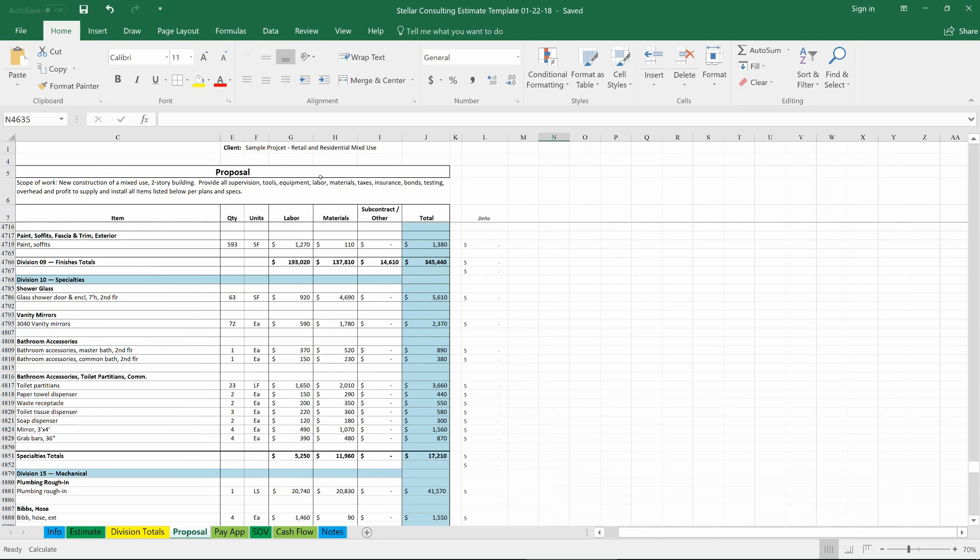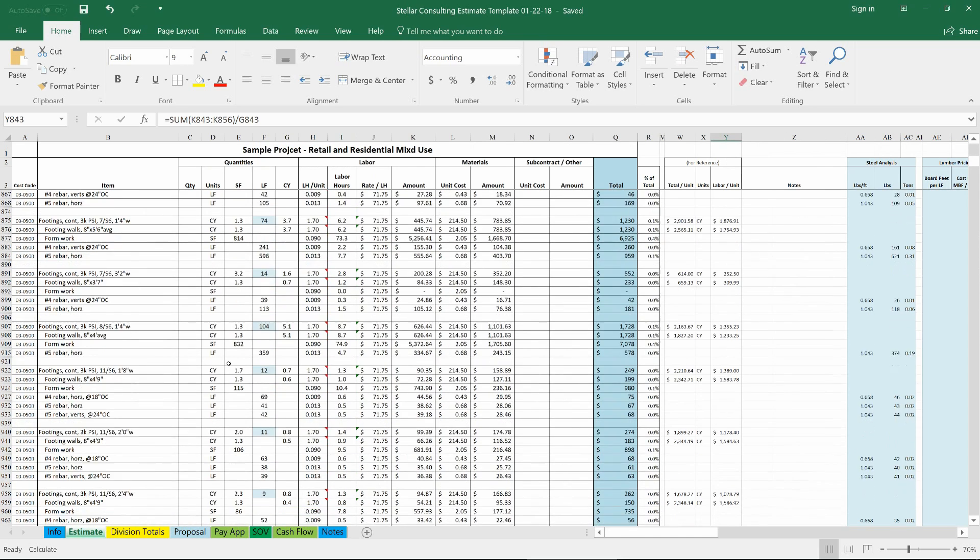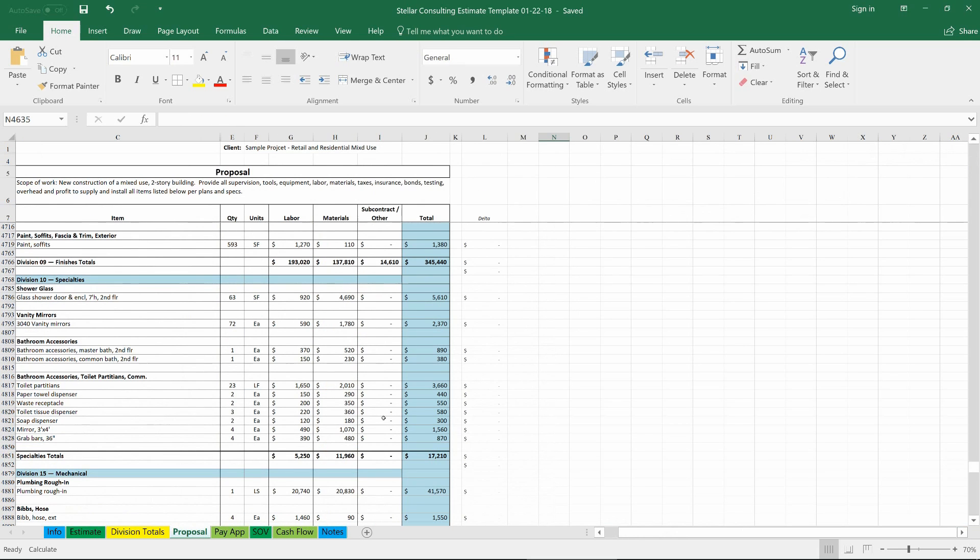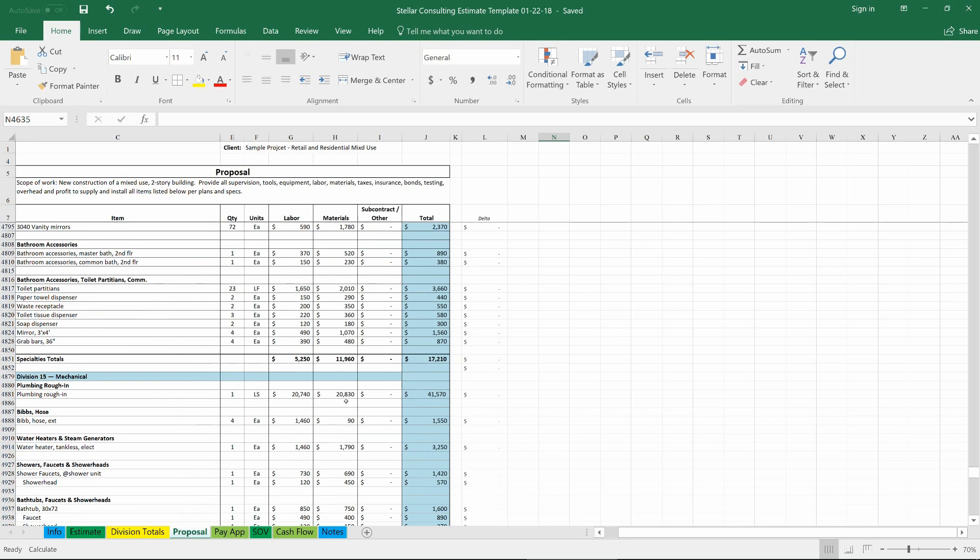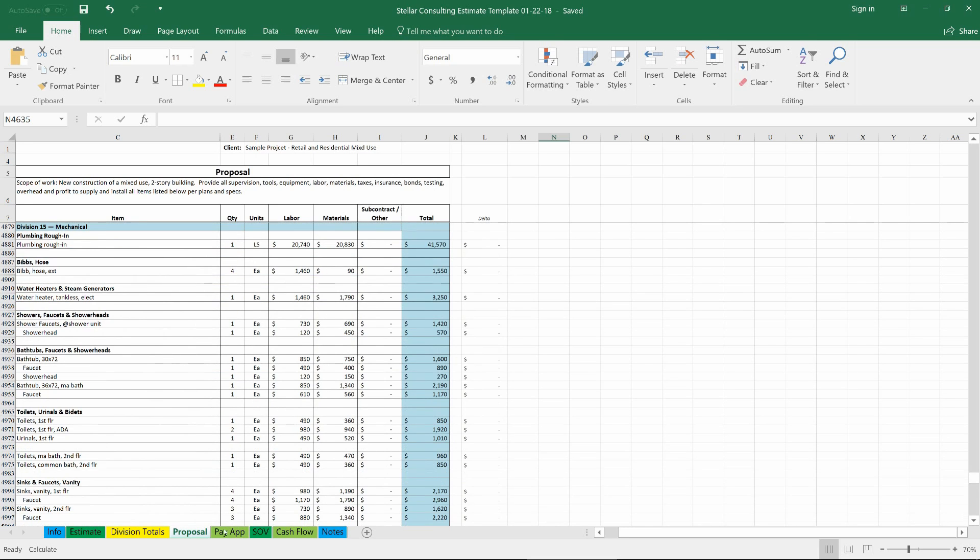A proposal tab, this can be driven directly, which is really helpful when you have plans that are in flux and designs and changes. You can be in the estimate and making modifications as they occur and make a proposal, and then as new modifications happen, everything is linked and so everything automatically changes.